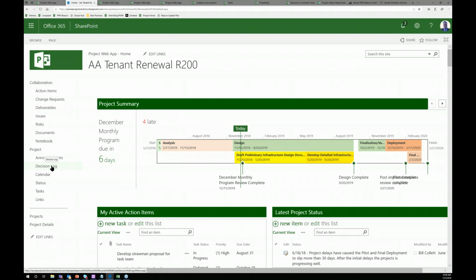One of the things a lot of PMOs have problems with is to actually record their decisions and stay focused on a direction without having to remake decisions all the time. Well, if you have a decision log and you're writing down your decisions, then you can revisit that with your team and say, no, 2 months ago we already made that decision. Let's move on and keep working. It's a great way to keep people focused.